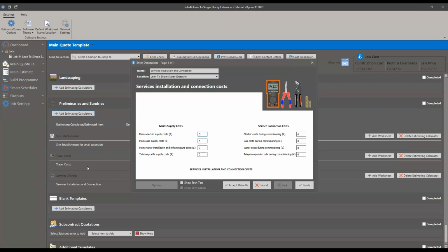If you can save money by digging your own trenches for the services, then go straight ahead. You can use the repurposed drainage calculators for that one. A bit of drain run, no pipe. Just remove the pipe and leave you with the pea gravel and protection for any services coming in, or swap the pipe for something else, with another channel for something to be fed through.